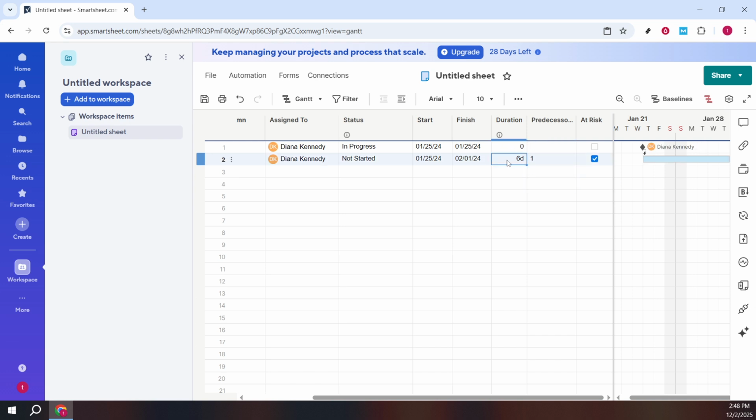If you don't immediately see the diamond, make sure the row is not a parent summary and that your Gantt chart is visible on the right. You can drag the diamond left or right to fine-tune the date, and you can still include notes, owners, or attachments on the row without changing its milestone status. If you're using dependencies, keep in mind a milestone can be linked just like any other task, which is helpful when you want downstream work to wait for that key event.